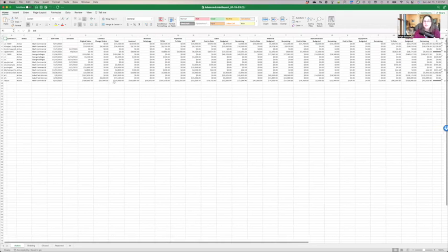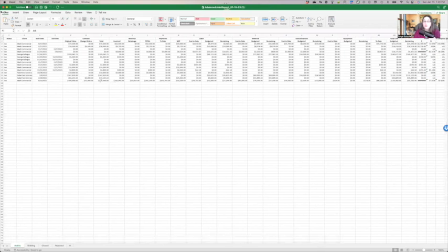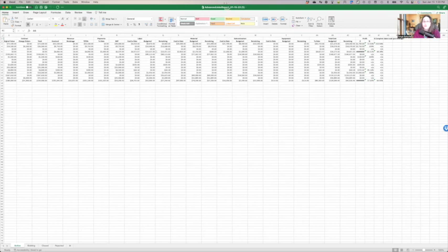On the advanced jobs report, we can see a number of open jobs, and we'll see our contract, and we'll see what we've billed. And then of course, across those subcategories that we're talking about, labor, materials, and subcontractors, we'll see our cost to date versus budgeted and what's remaining. So some really great budgets versus actuals data that you can get out of Knowify.